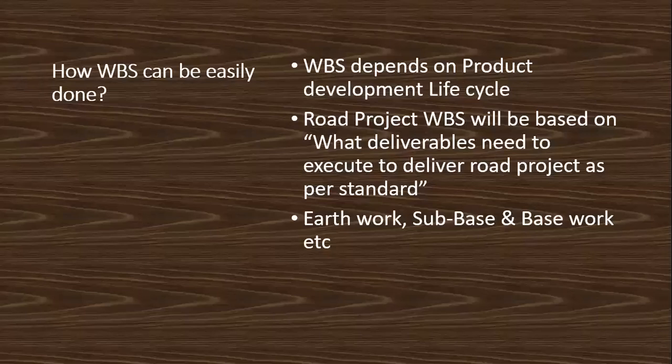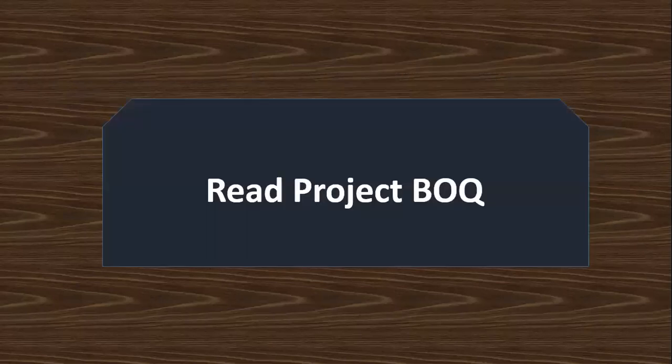But the best second thing to develop your WBS is the development phase of your product. So here are a few tips I recommend to develop your WBS. WBS depends on the product development life cycle. Like road work will be based on what deliverables need to be executed to deliver a road project as per standard. Like you have to complete earthwork, you have to complete sub base work. I will explain this in the BOQ. So I'm going to share with you one BOQ.